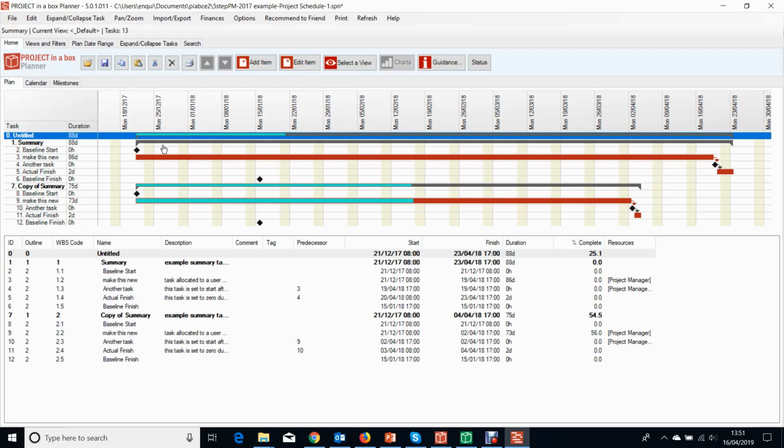You can have summaries within summaries within summaries, and you can have all that nested down, and you can have different mixtures of tasks and so on, and it will roll up all that information for you. It just does it. It knows how to do all those things, but it's built from 3 simple building blocks. 2 types of normal task, a basic normal task and a milestone, and a summary task. And those are the building blocks of a plan.